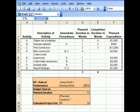Now let's go back to the budget overrun. In order to solve for the budget overrun, we would need the actual cost for all of the activities in the project. Since we are not given the actual cost for all activities, we can only forecast the budget overrun — the best guess of whether this project will be over or under budget. Based on the estimated project end, which is twice the number of weeks of the planned duration, we can forecast that this project will be over budget.